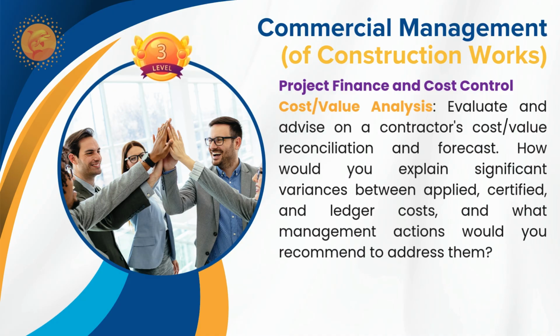Cost value reconciliation is the exercise we usually do to verify whether we are achieving the value according to the cost we incur. So it is the value we are receiving divided by the cost incurred. Usually it should be more than 1. If it is not, then we are not getting the value certified for the cost incurred. So it may be a cost overrun or maybe a delay in approvals. What are all the reasons it could be?